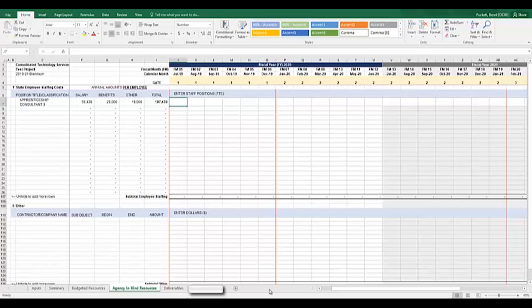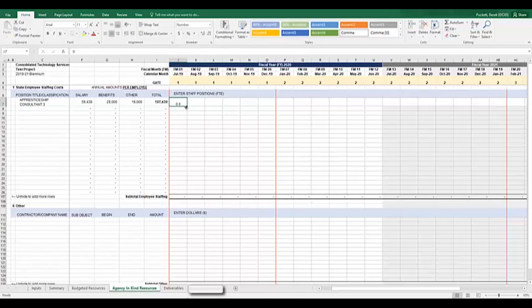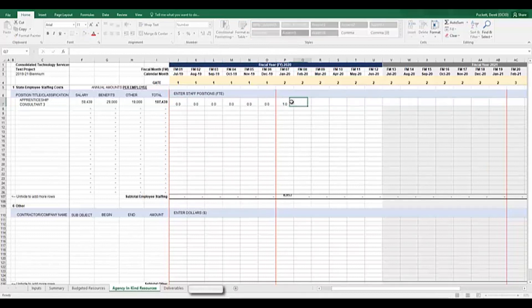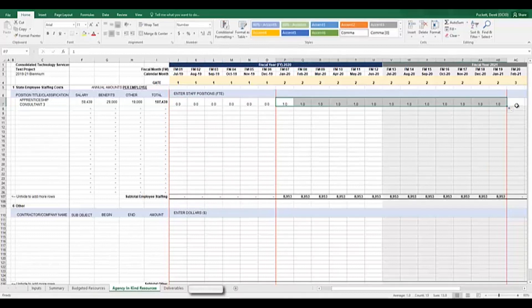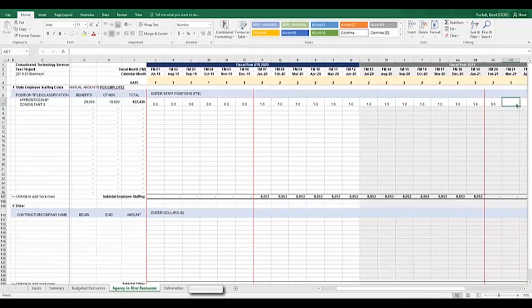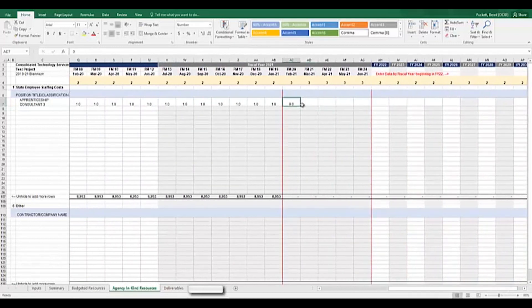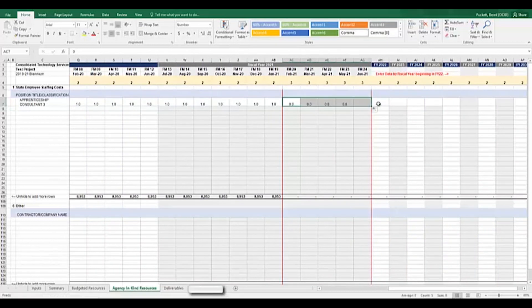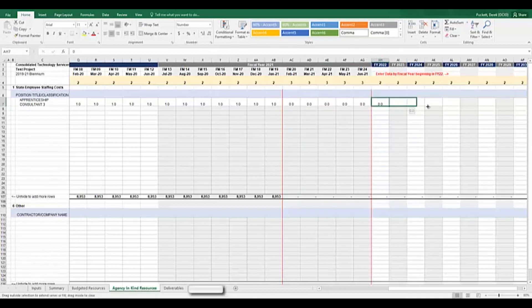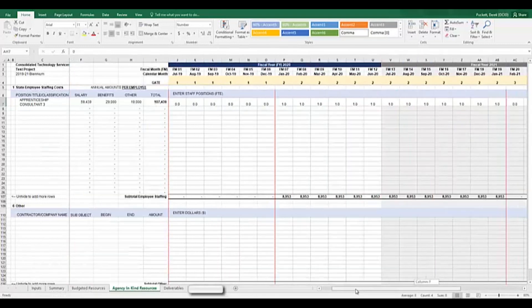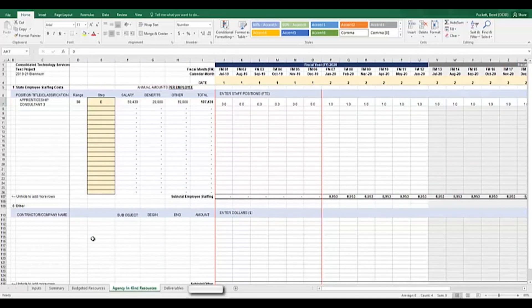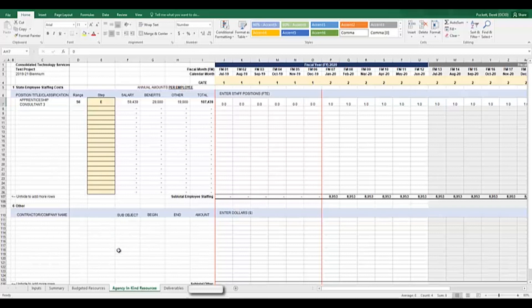If you have an in-kind resource that you expect to spend a lot of time on the project, but perhaps drop off for an entire gate, you should put zeros in the columns in which that resource will not be working on the project. So for example, I expect to not use this resource that I've identified at all on the first gate of the project, but then I expect to use them full-time on the project for the entire second gate, before they drop off to zero again for the final gate of the project. I only need them for the first section of my project, and I will put zeros for the values for the out-years, because I do not anticipate to use this resource at all during those out-years. Beyond the resource plan, if there are other costs related to existing staff that you wish to capture, you would key those values into the other section below. There are no drop-downs for this section, so just input the sub-object you expect to use in column F. That's all there is to cover on the Agency In-Kind Resources tab, as it's very similar to the Budget Resources tab.